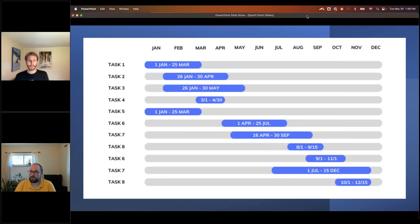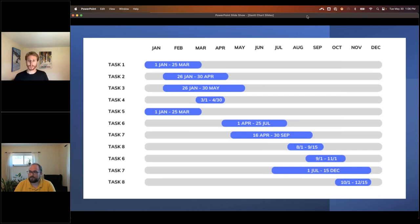If you know that task seven can't start until task two is finished, you want to be able to tell that right away — is task two getting delayed? The Gantt chart gives you a really nice way to just glance down the list and get a clear picture of what's going on with the project without having to wade through too many details.